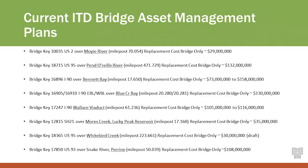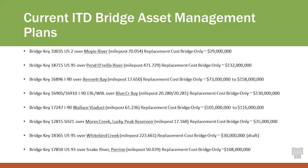Out of 1,800 bridges, we can focus on 12% of our program and it just improves the model. It would be almost impossible to put this much effort into each single bridge, but for these signature bridges or the bridges causing real problems, it's money well spent. Here are the ten bridges: the I-90 Wallace Viaduct over the town, the Ponderay Bridge about a mile long, I-90 on Bennett Bay, I-90 on Blue Creek Bay, Morris Creek, the Prime Bridge, and probably the largest K-frame made in the United States — our White Bird Bridge. These are bridge replacement costs shown here, and it definitely helps in our program scenarios and communicating to management and legislators about appropriate planning for future funding.